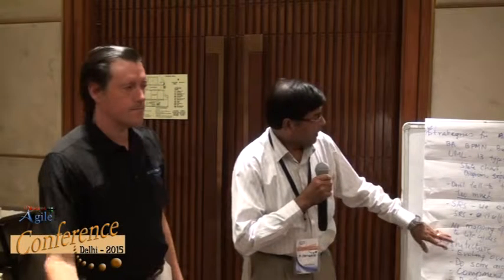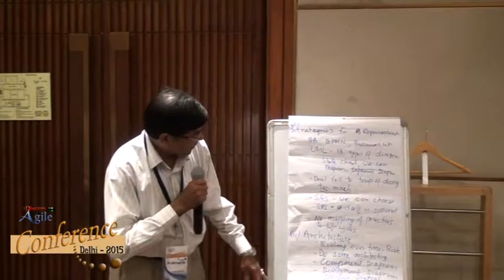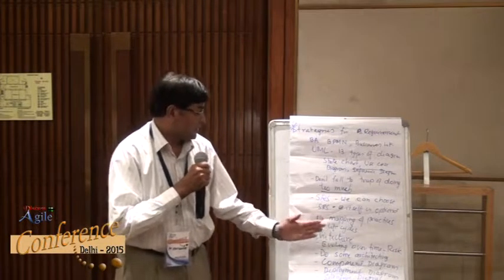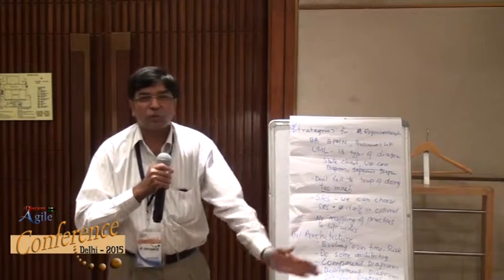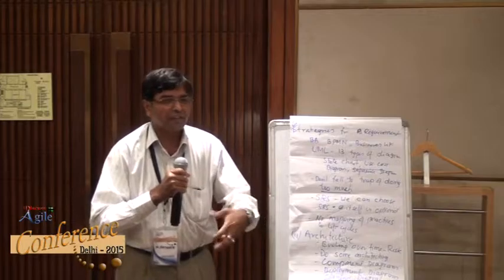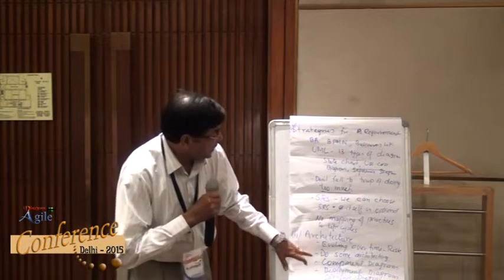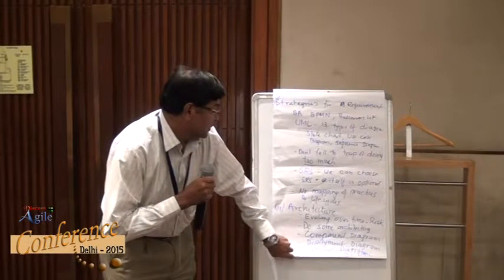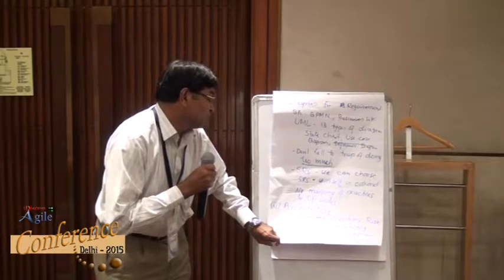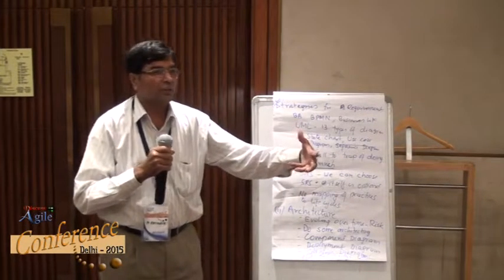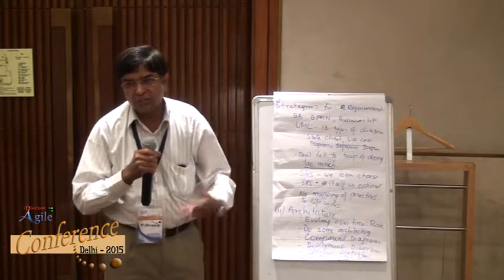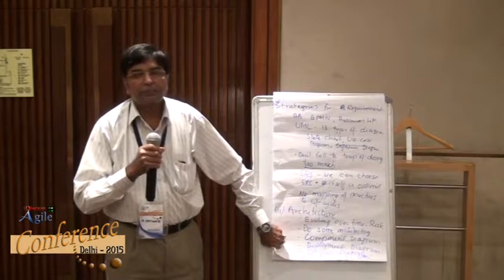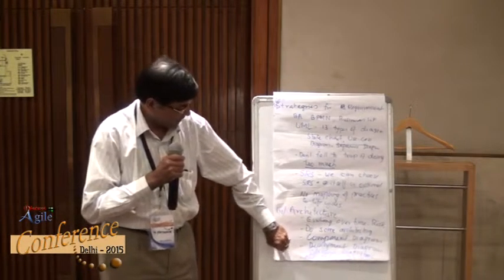Right. Great. And there is no mapping of practices to the life cycles. That's another point. Coming to the architecture, similarly, what are the different options? In Agile, so much time is taken on architecture, or it totally evolves. But here he says that upfront you should have some architecting, maybe at least 2 weeks. There are some architecting options like component diagrams, deployment diagrams, or sequence diagrams. It's not necessary that you use UML notations only. You can use Visio for that matter. Yeah, just different tools for managing the requirements or handling the architecture, which gives you additional flexibility in what you are comfortable with.